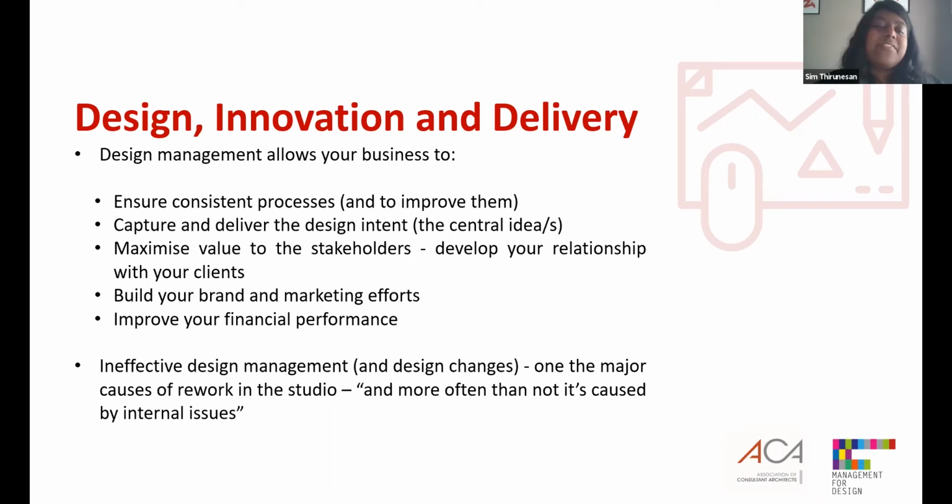We often find that ineffective design management is one of the major causes of rework within a studio. Unresolved design work, design changes can be the biggest issue for most studios. For example, a design review occurs late and someone comes in, changes things, and the design is not fully resolved and we've already started to draw before it is. That rework based on design changes is one of the major causes of loss of productivity in a studio. So, we can talk about reduced fees and competitive pressures being challenges, but at the same time, internal issues such as this undermine your productivity and your overall business performance.